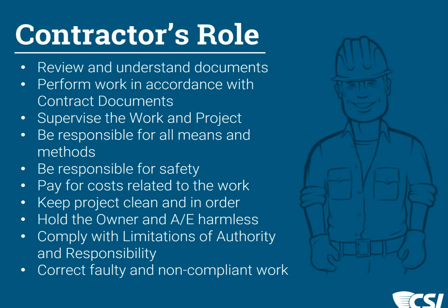And in addition, they are responsible for paying for all costs related to the work, to their subcontractors, to their employees, and anything that is involved with taxes, royalties, license fees, warranties, any of the equipment, materials, all costs related to the project at this point are theirs to bear. And that would include the building permit and any kind of inspection fees that are associated with the project.